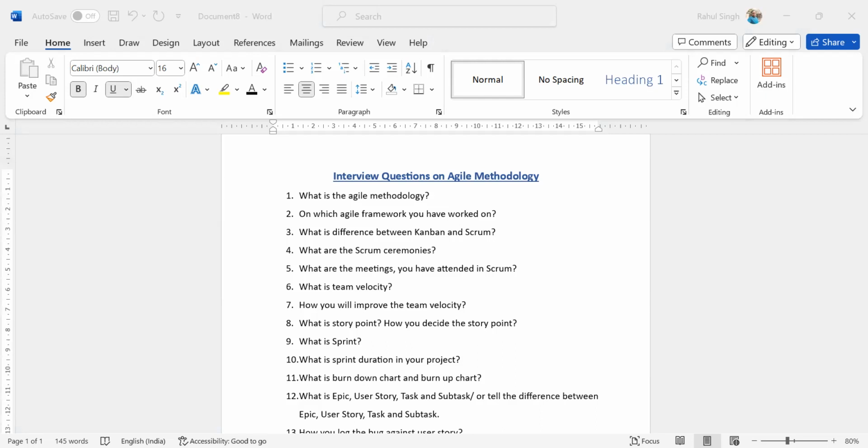For generating revenue, we need search product, add to cart and buy product. So these three things are most important rather than login and registration, right? So the customer decided what is more important for me. And remember, for production, for live, login is necessary, but that is under development. So for the development, what are the important features for my application?